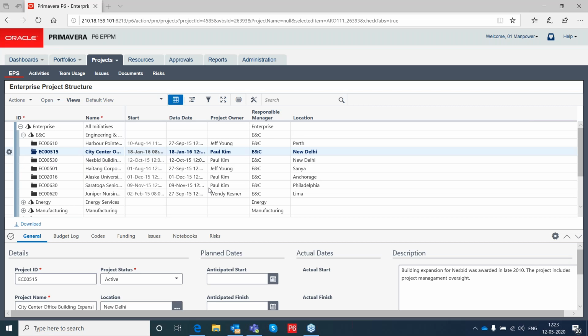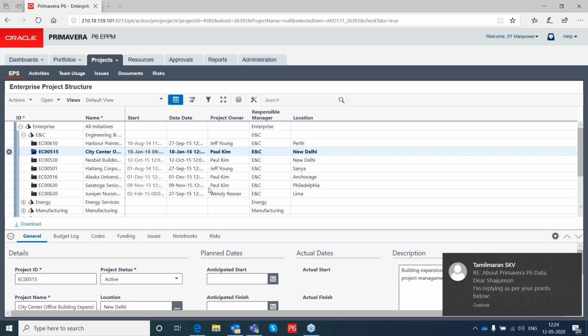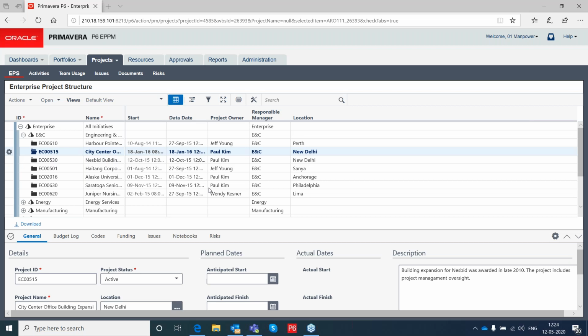We learn that information very late in projects, and when we notice there is a problem, you would already have spent a good amount of money, and you will be going for change management. And claims are very poor. We don't know what's happening or why we did this; no justification is recorded. At a later stage, when you go back to the contractor or your owners to discuss claims, you have no records and no justification for why this price or cost has gone high. This is all because of the Excel sheet. Excel sheet is a real problem when you do cost control or management using it. It's pretty handy, but it's not actually useful, to be frank.